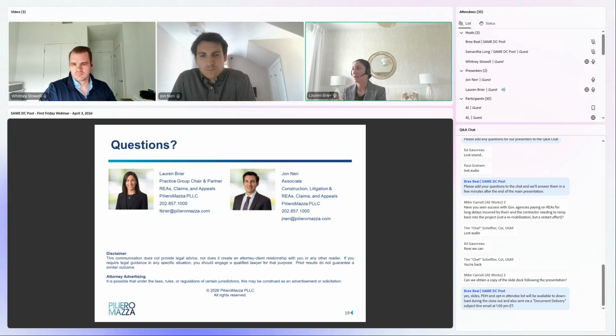So not only do you have this default on your record, but then you're paying the government to then pay this other contractor. So it's extremely harmful. It can prevent you from receiving future work. So ever more reason to take it seriously. And that's why I tell clients, as soon as you get a cure notice, if you start to get a sense that you're going to be receiving a termination for default, that you engage counsel right away, because what you're starting to do at that cure notice phase is creating a record of defense for you as a company. And so it's really important that you engage counsel early on in that process, because you don't want to be making admissions in those responses.